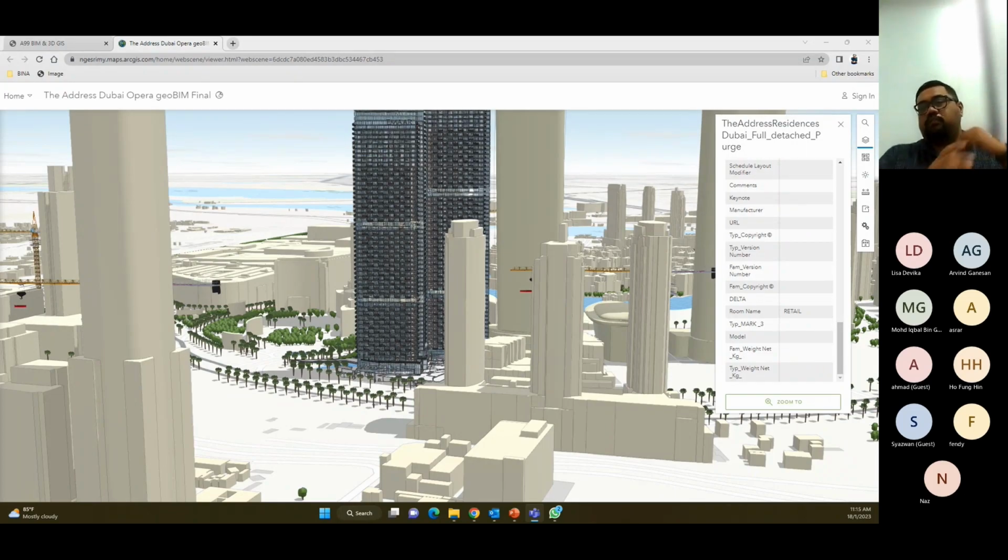So what you can do is appoint a full-time BIM coordinator. Which means the BIM coordinator needs to go on site daily with the site coordinator and make sure that the physical installation is exactly the same as the 3D model. If not, basically the BIM coordinator needs to mark up and update the 3D model directly there. So that's why the BIM coordinator is a very busy guy, because they need to go daily to the site.